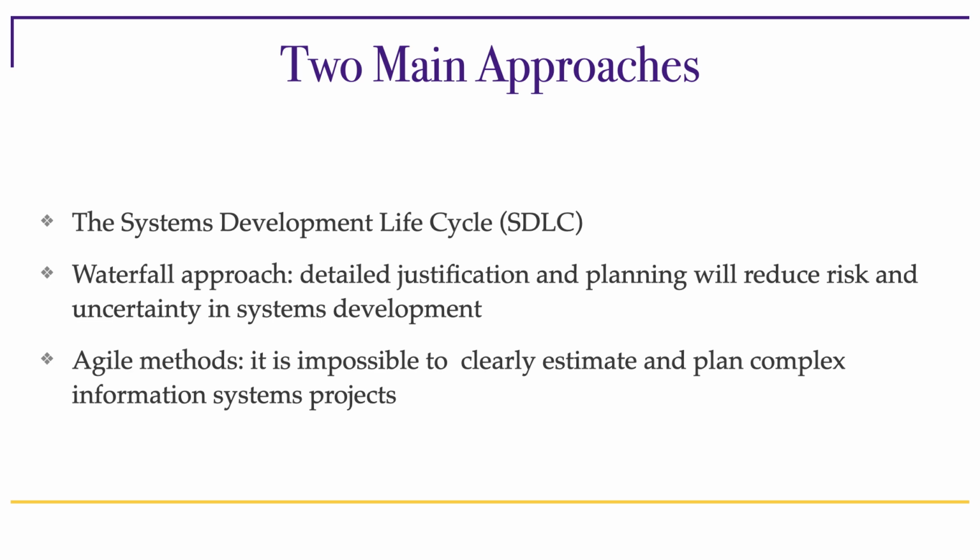In that phase, there is a long time and a lot of analysis spent on trying to make sure that the requirements that are established from the client are precise and complete. Because once the project then starts, the goal is not to have to reevaluate these requirements and keep all of the changes of the project to a minimum.